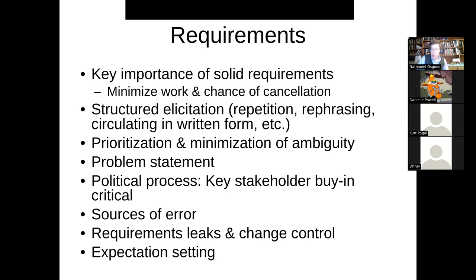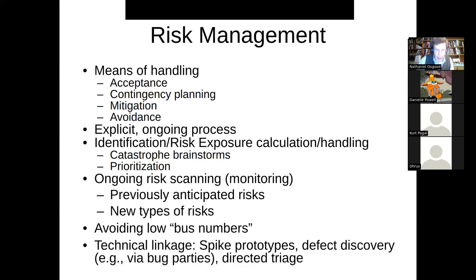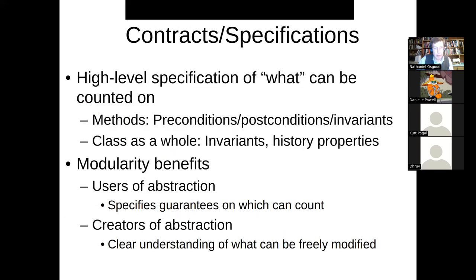I did provide some suggestions for requirements, this idea of structured elicitation, repeating back what you hear from a stakeholder, rephrasing it. And when I say repeating back, often it's rephrasing it and saying it back to them. Asking them to say it again could be good, but there's a risk that they'll use the same technical jargon. And you want to generally put it into your own words and see if you've got it. Circulating it in written form early, et cetera.